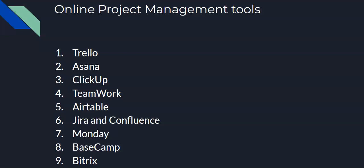As a manager, you have to distribute those tasks and assign them to different people in your team. If you're a team member hired, you will need to gather all your set of tasks from your manager. What's assigned to you? And not just specific assignments - there are also tasks that you need to collaborate with your team members. Task dependent tasks, where one team member is waiting for your output because they can't start their task without receiving the output you produce. That's task dependencies. Where can you see all that? It's inside the project management tool.